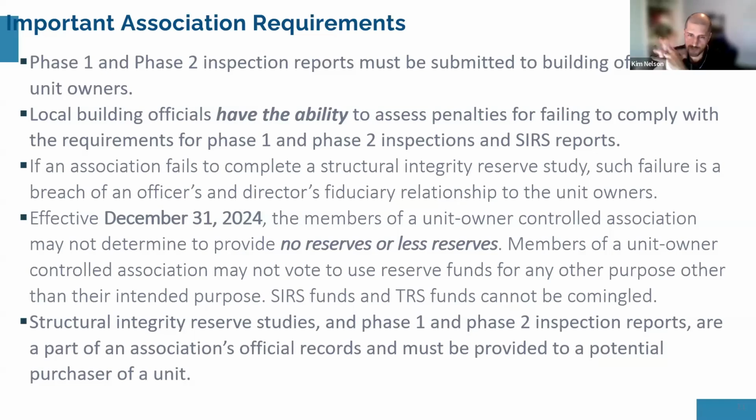So that caution being stated, whoever you hire for a phase 2 will basically be hiring the engineer or architect that you hire, the general contractor and any subcontracted vendors to conduct an investigation to discover the full extent of this significant structural deterioration, the first signs of which were discovered in the phase 1, so that the full extent of the significant structural deterioration is completely understood.